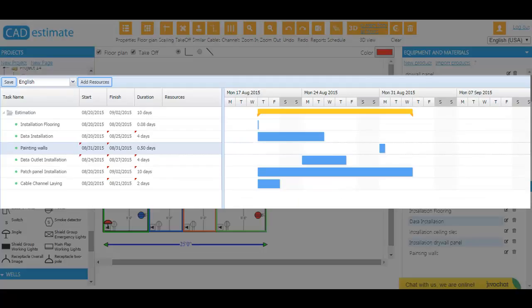Get work schedules in the form of Gantt charts right from the estimate function. Timing is pulled from work items, which can be easily modified.